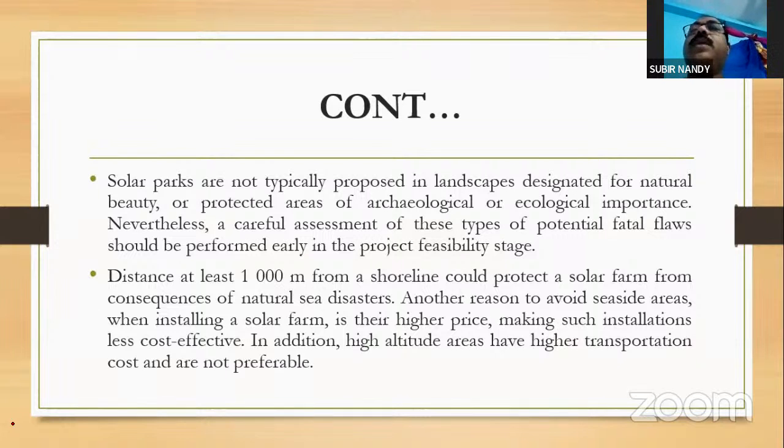Solar parks are not typically proposed in landscapes designated for natural beauty or protected areas of archaeological or ecological importance. Nevertheless, a careful assessment of these types of potential fatal flaws should be performed early in the project feasibility stage.